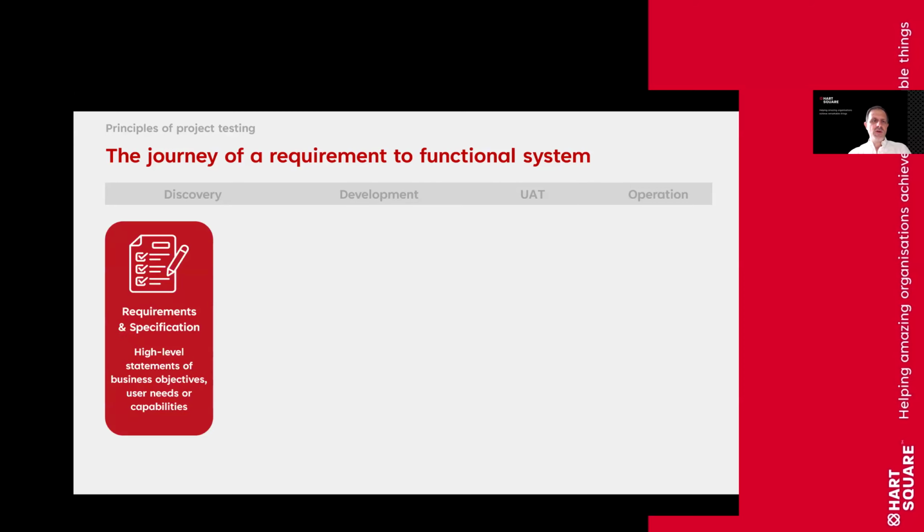So if we now look at the first stage, in the discovery phase, you should be really defining your requirements and building out the specification. So a high-level statement of the business objectives, user needs, and capabilities. Sometimes those requirements will have been captured, or they should have been captured, when you went out to tender, and so those requirements then become built on that. But they really are the product of completing the discovery process, which can sometimes take up to 3 to 6 months even. And really what you're doing there is defining and writing down exactly what the requirements are.